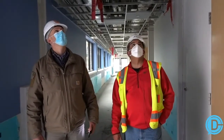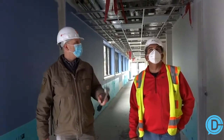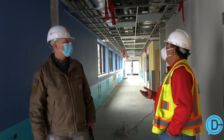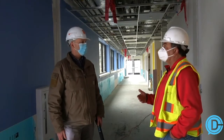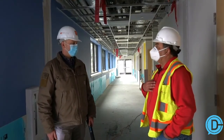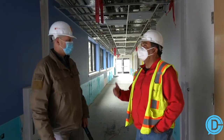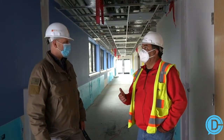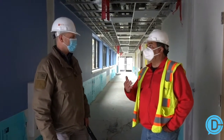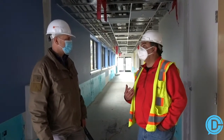There's a number of factories out there that do work, but they really do a real nice job with their finishes and their MEPs. Sure. Their sub base is one that they've used over and over. They've gotten used to doing the work. They've gotten used to us and the standards that we set. Because we send our project managers and our superintendents down into the plant while this is being fabricated. They sit in on those meetings, and they communicate with our subcontractors. It's the only way we would be able to bring this level of product out.